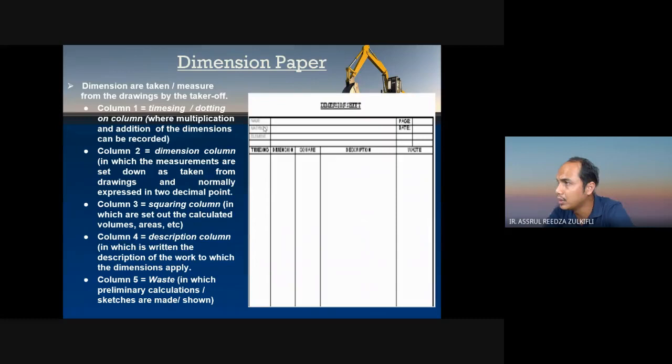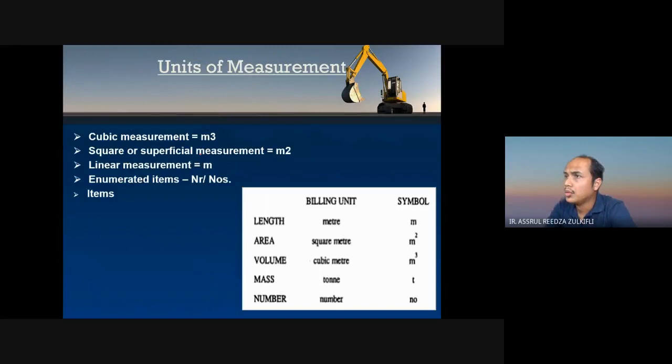This is the dimension paper, which we have looked at previously. It has the timesing column, the dimension column, and then the answer column. This is the description of work. The unit of measurement for cubic measurement is meter cube. Square or superficial measurement is in meter square. And the volume measurement is also in meter cube.